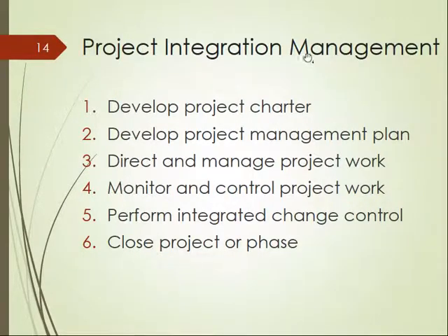It covers a number of areas that tie the whole project together. For example, initially you would create a project charter, which is a short document that highlights the key things you expect from the project, and also a more detailed project management plan, more detailed than the project charter. And there are these other activities that are part of the project integration management.